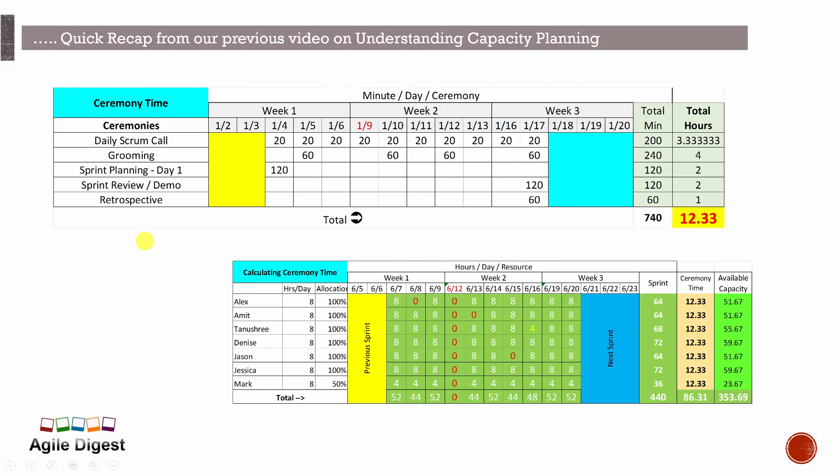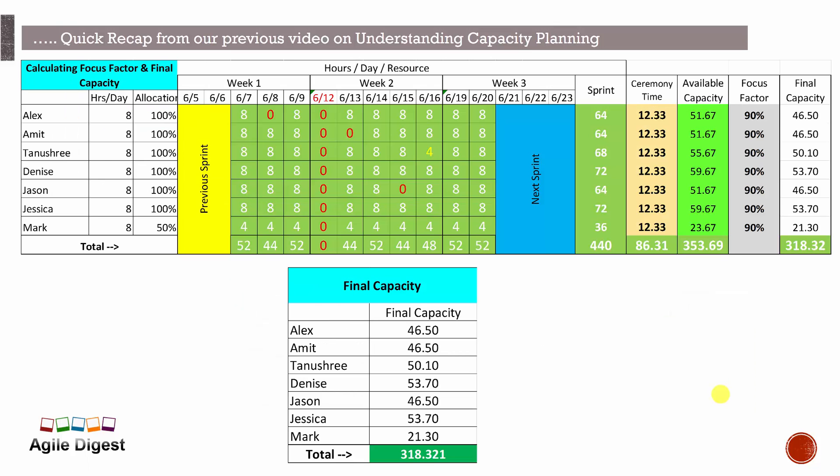You can do it based upon your need, and we found out okay, 12.33 hours we are spending for the entire sprint of those two weeks duration. Now again, if we reduce that ceremony time, it's coming to this much of value, 51.67, and up to 353 hours per sprint.